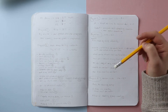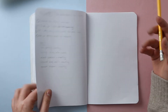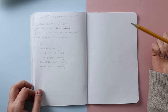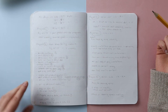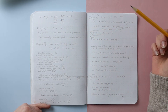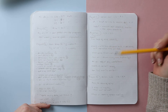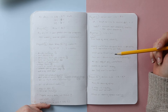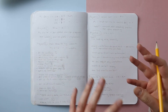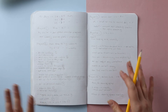That's two examples of how projects can differ. I did the same for projects three, four, five, and six, and that whole process took me about an hour — not bad for completely breaking down six projects. I also thought about the dates carefully: this shop project is a lot of work up front by the end of May, so the bulk of the work on project four — restructuring and streamlining my work processes — starts after this finishes, so we don't have too many tasks at the beginning and not enough at the end. You want an even spread, and you should also take into account any vacations.